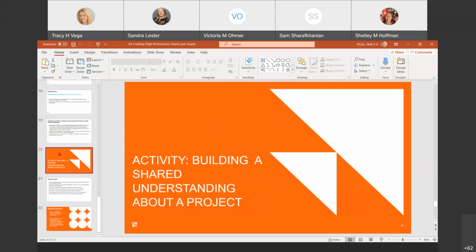The question was, to ensure that you have necessary buy-in, commitment, and resources to make the project a success, you offer the team assistance in creating the charter. So the first problem with that was the charter should already be in place. Once there's a team, the charter's in place before anything else happens. There wouldn't necessarily be a team before there's a charter. There's not a project manager until there's a charter normally, and there's not normally a team and resources until there's a charter. So that was the first thing. And if you don't have that, then there's a lot of confusion and misunderstanding.